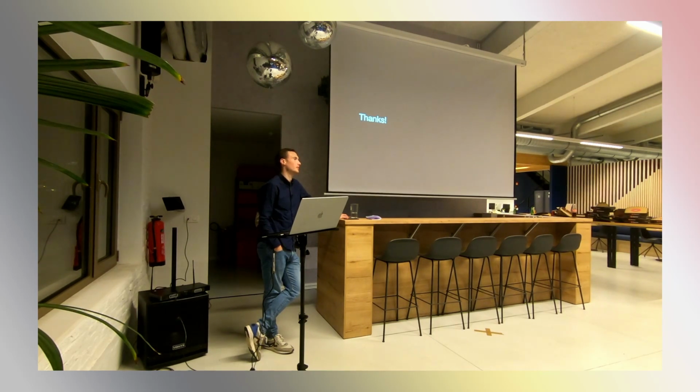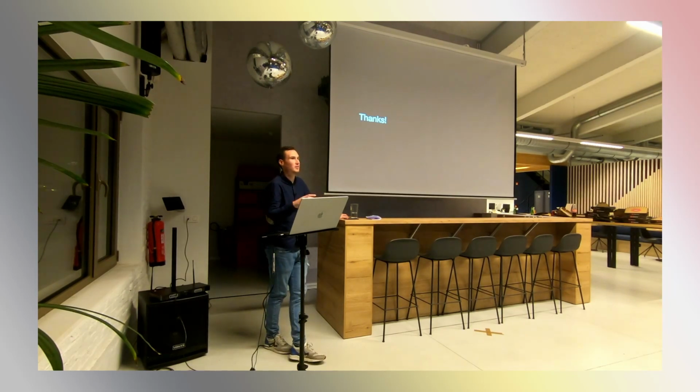And the only depending factor is then the velocity a team can make. For example, a junior developer will have a velocity of 3 story points a day, and a more senior developer maybe 7 or 8. That might make a difference in timing, but still the complexity is the same. So it doesn't really matter who's going to build it or who's going to estimate it. But as a project manager, it's easier to have some key references to story points to plan better. So 5 story points is 5 story points.